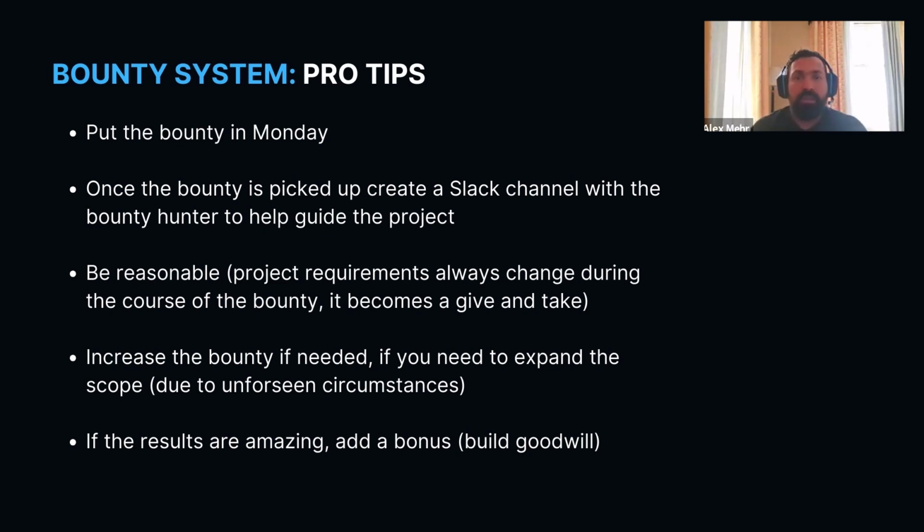Okay. And also, again, it goes to goodwill. If the bounty is 5K, let's say you're charging the customer 20K, the bounty you put in is 5K. You get the project, you work with the engineer to deliver it, you give it to the customer, the customer is happy, it's above expectation. Put a $500 bonus on the $5,000. Okay, build goodwill. It pays off over time.